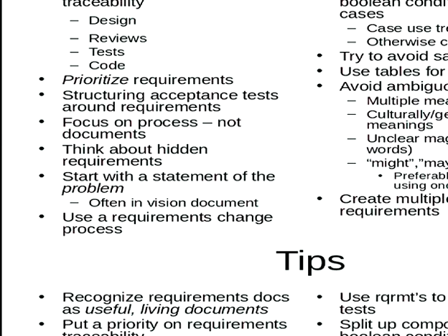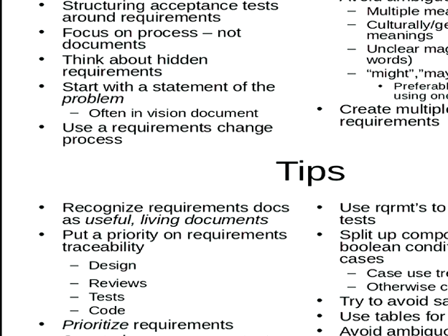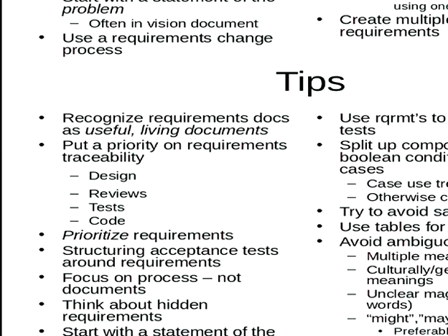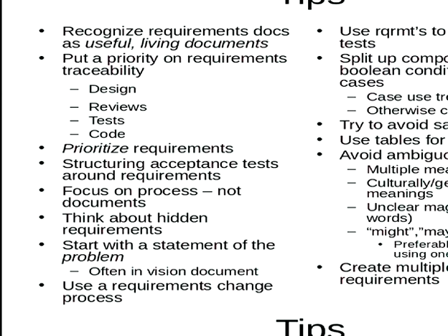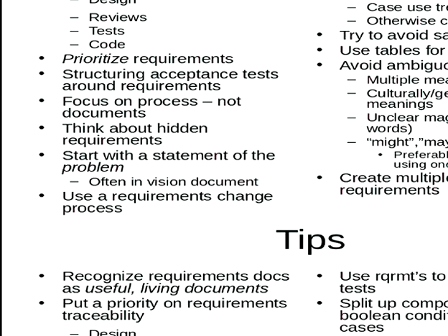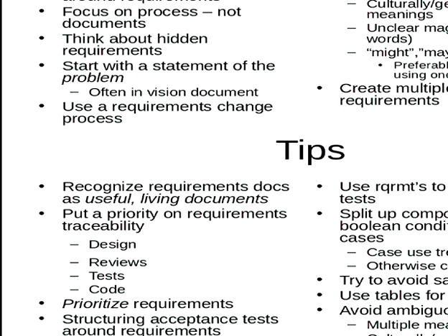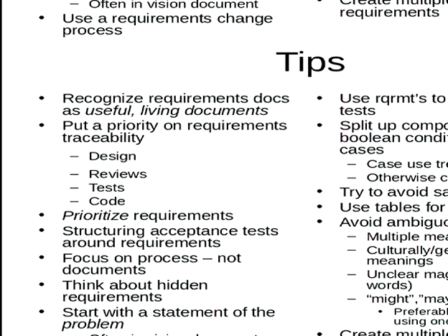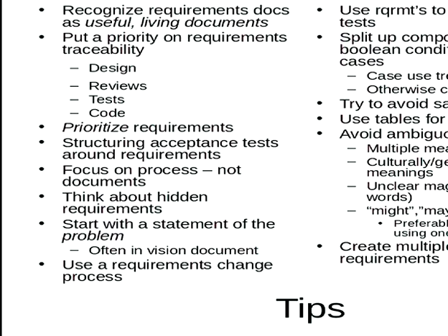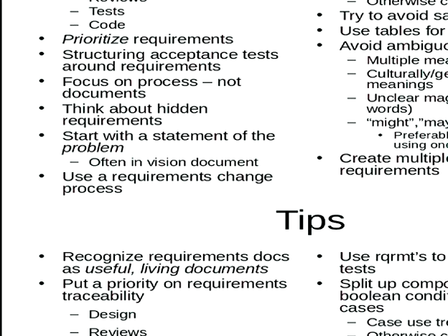If you know this requirement goes with this code or with this part of the design or this test. Yeah. If the requirements change, or if the requirements are not realized, right? You may have certain ideas in mind for what you are achieving within this milestone. And so you're saying, okay, we have these classes which are needed, these interfaces, these tests, these acceptance tests, as well as an integration test. And now you decide, look, from a triage perspective, it's not safe for you to try to get the system to record video on this particular iteration. We're going to leave that to later.